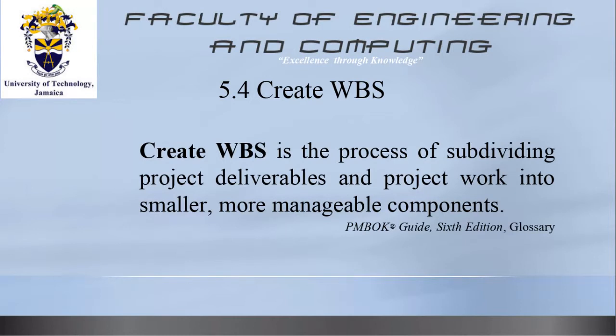And so we want everything to coincide, right? Because it's one project. So we want to know that the moment our builders are ready to erect the new structure, the space is vacant, meaning the other building would have been knocked down. So we create a micro project there. We're breaking it down into smaller, manageable components.